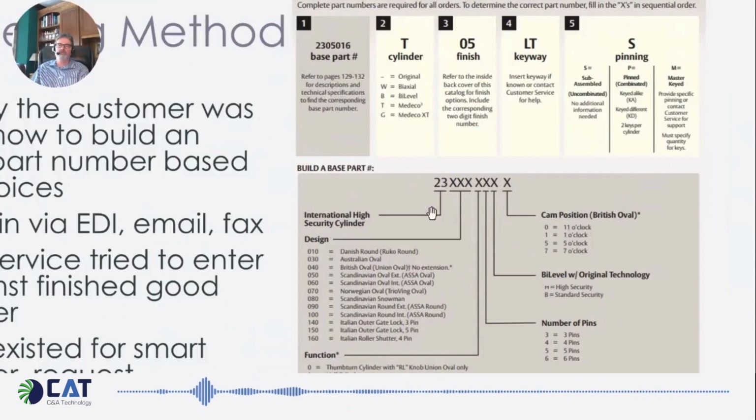So the problem with the plan was even if we implemented SKUs, we still had some challenges. We still had to convert hundreds of thousands of item numbers, bills of material, and routings from the old system to JD Edwards. And a lot of the bills of materials were wrong. They were old, hadn't been used in years, maybe decades, and the routings were different. Maybe they put in more automated lines on the floor to make the product, and some of the old machinery that it referred to in the routing just wasn't even correct anymore. So it wasn't like it was just, convert bills and routings from the old system.